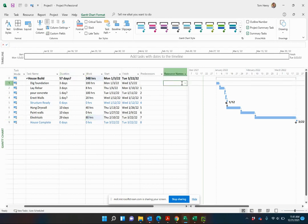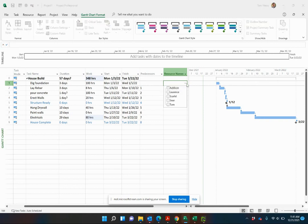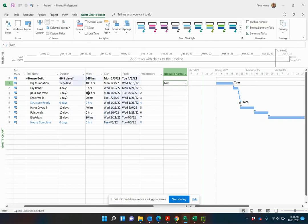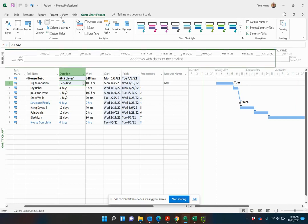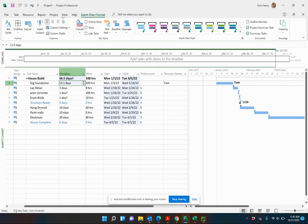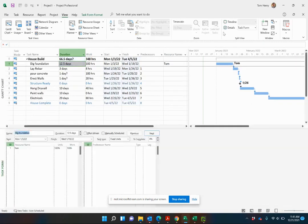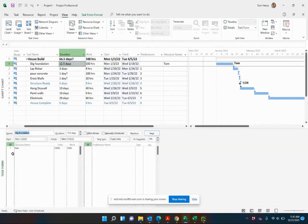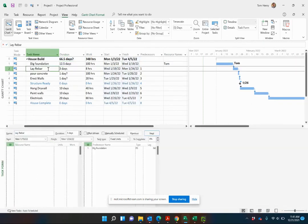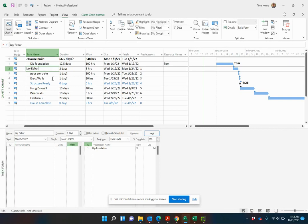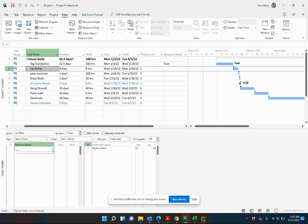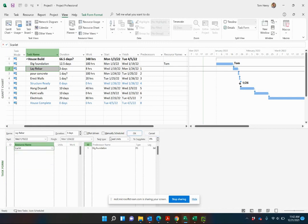When we start now adding resources to these tasks, you can see how it's now calculating and adjusting for me. If you really want to get a little bit more granular on this, you can come to the view ribbon and check details. This is the task form where we can see for a given task what's going on. It's three days. We can see how much work's going on for this particular task, lay the rebar. Now, what we have to do is assign a resource. Put Skylar on that one. See how the work is calculated.